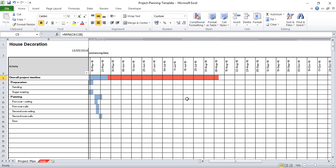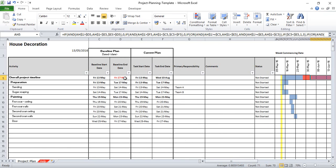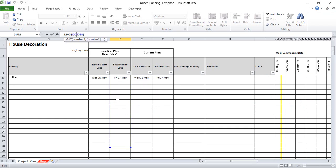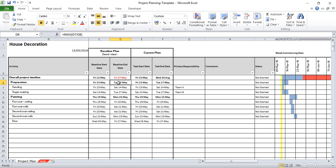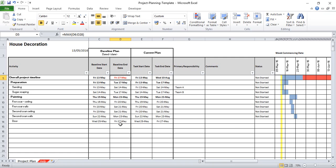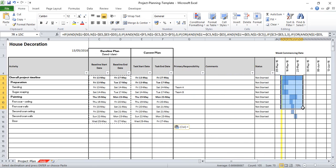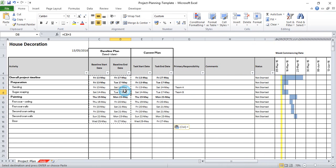Now, what we notice when we cleared the contents is that all of this has gone red. The reason it's gone red is because this overall project timeline is referencing a formula which looks for the maximum value across all of these cells, and that is then comparing it to my current plan which has got an end date. The reason that happened was because this is a formula which was created based on all of those rows we've now got rid of. When we copied and pasted special, it took the value which is now not correct. So I'm just going to copy those values across again to get a nice clean plan.